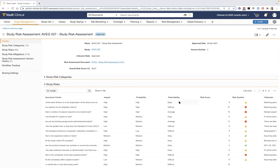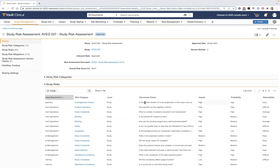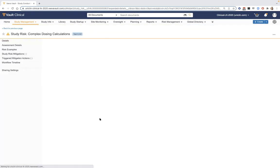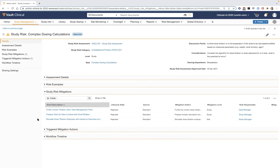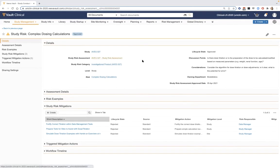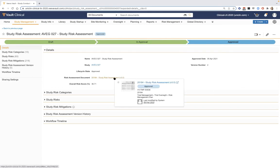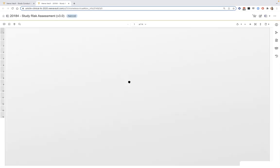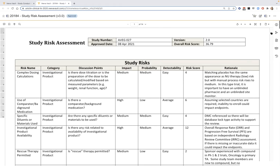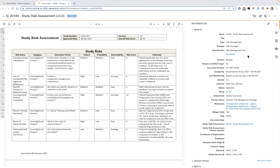As we assess each risk, an automatically calculated risk score is generated along with a symbol denoting whether it's a high- or lower-level risk. Templates also include mitigation plans to drill into and select, with options to use them as automatic action items or tasks assigned to appropriate roles in our study team roster. Completing and approving the assessment systematically generates a final document stored in the TMF, counted toward expected document line items without needing to create it from scratch.